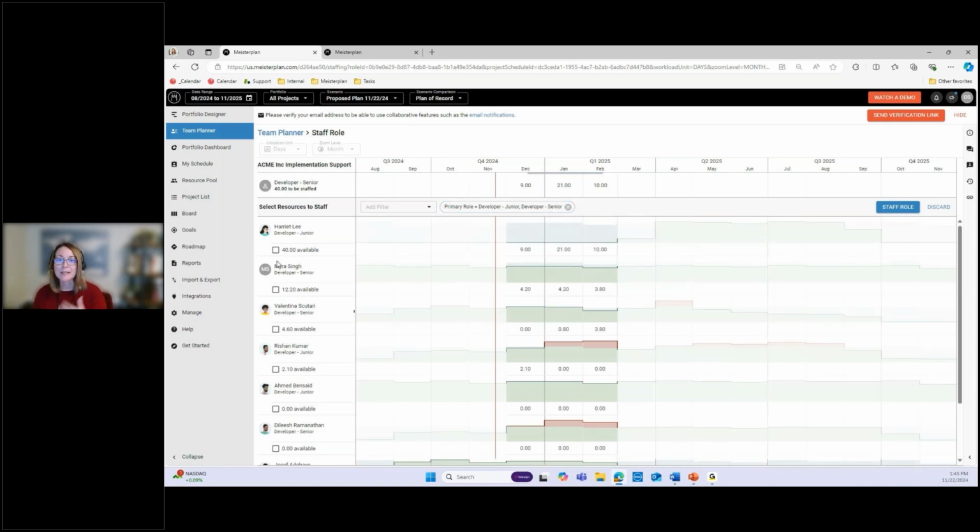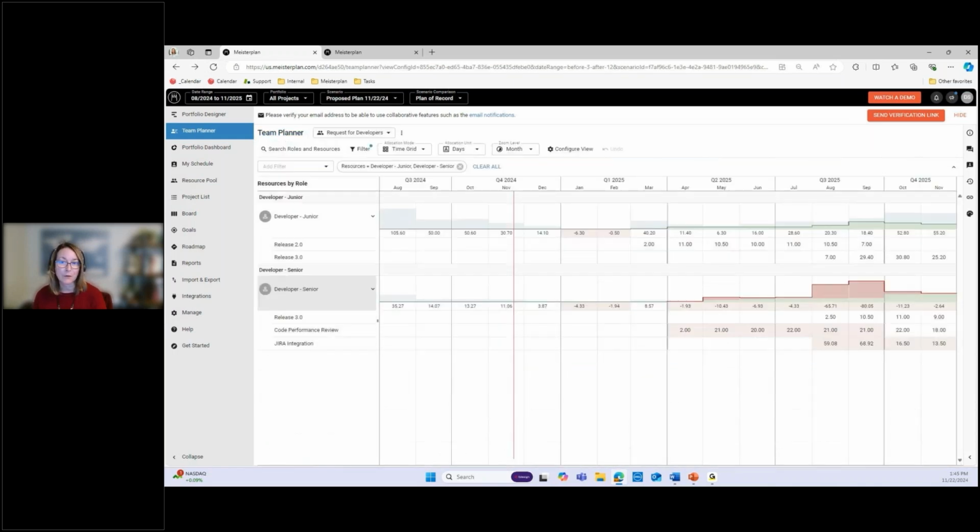Okay. To staff it, you would just quickly click who needs to do the work. I was able to fill this demand by Lee. At the same time, if I needed more people on this for, say, a certain, maybe some oversight, this is number of days, I can add 2 people here to this project so that, one, there could be some mentoring going on to a junior and staff this role. Okay, what happens there is it's moving that demand over to those people.